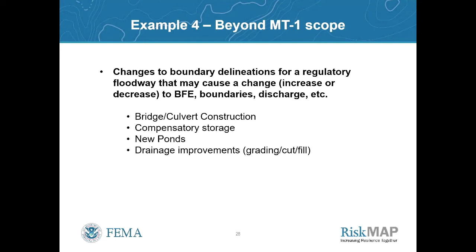Anything like this is beyond the scope of an MT1. You can't encroach within a regulatory floodway and be able to get the project approved through the MT1 process. It's got to require an MT2 to evaluate those effects.